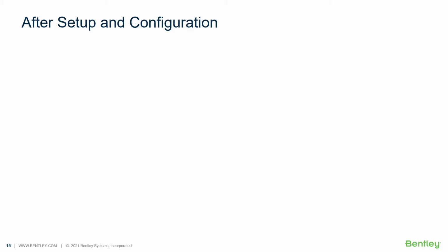From there, the next step in the process is a user acceptance test. So basically, we're going to present to you, the user, what has been configured, and we're going to take you through all the different business processes that you highlighted in the scope of work document. And we're going to make sure that you're happy with every single item. If there are some changes that need to be made, then those changes will be made, and then the user acceptance will carry on.